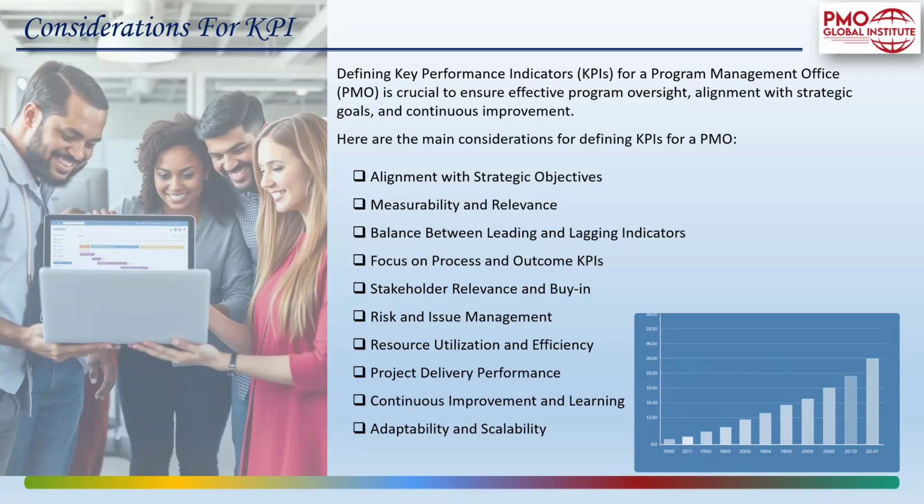It's mandatory for them to document the lessons learned, any risks they encountered during the project. They have to document what the issue was, what the risks were that they encountered, what mitigation steps and actions they took, and all that, so that they can improve based on that. And adaptability and scalability.